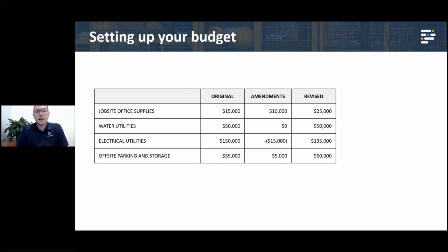You've got your original budget. The next column over, I've got my amendments. Maybe that is funding changes, or maybe I'm pulling money from one item and putting it into another item, or maybe I just have new resources that I need to add or subtract money to. Those would be called amendments within ProjectTeam. Once you have your budget, you can lock down the fields of your budget, so any further changes must be done through amendments, making sure that you correctly track all of that data.